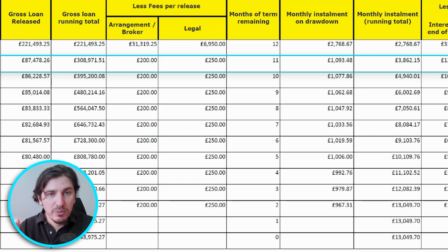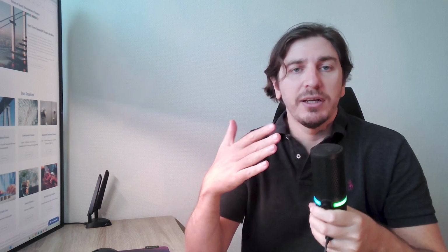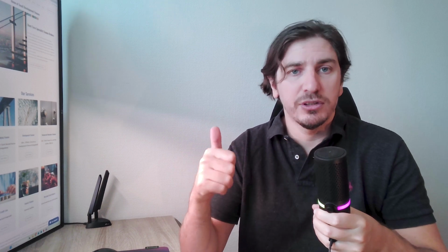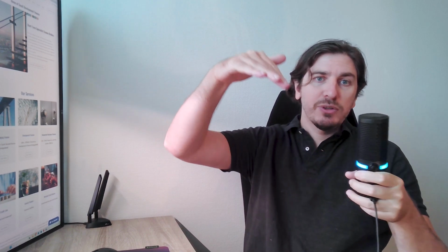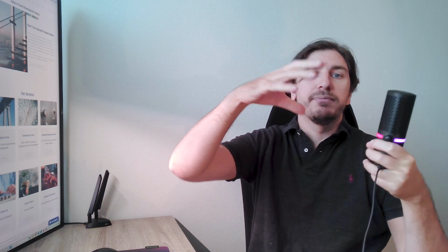They have some caveats of how the money is released, but it's only indicative. And what they've done here, which most lenders will do to some extent, is they've done a relatively linear drawdown curve, which if you've done any developments at all or know of any, that isn't accurate at all. Typically, the drawdowns are done larger ones at the start where you're doing a lot of construction work. It will go in a bit of a downwards slope slightly, and then up again as you get towards the roof, etc.